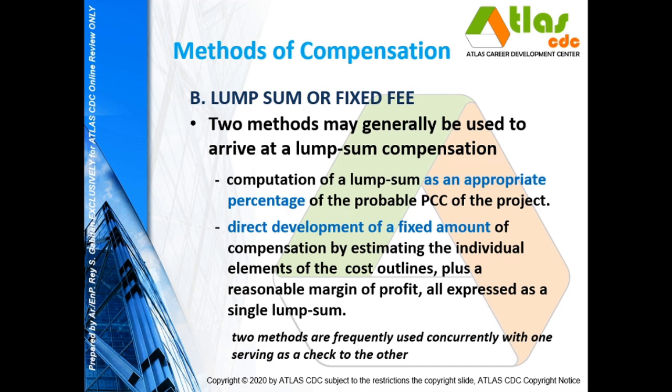Now the second method is to compute your fee by a direct development of a fixed amount of compensation by estimating the individual elements of the cost outlines plus a reasonable margin of profit, all expressed as a single lump sum.